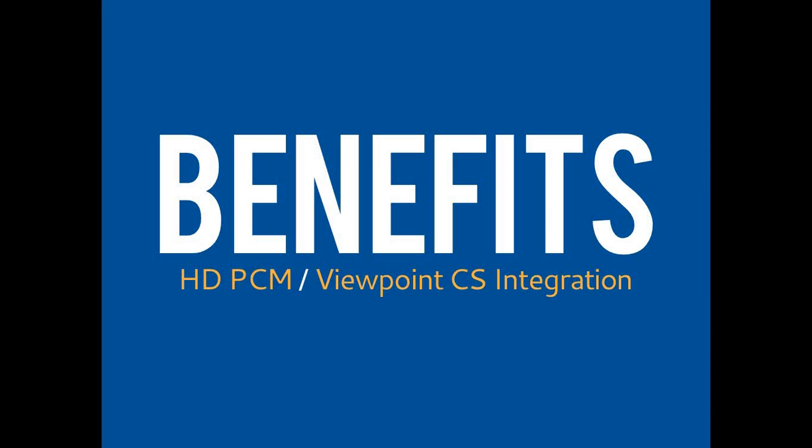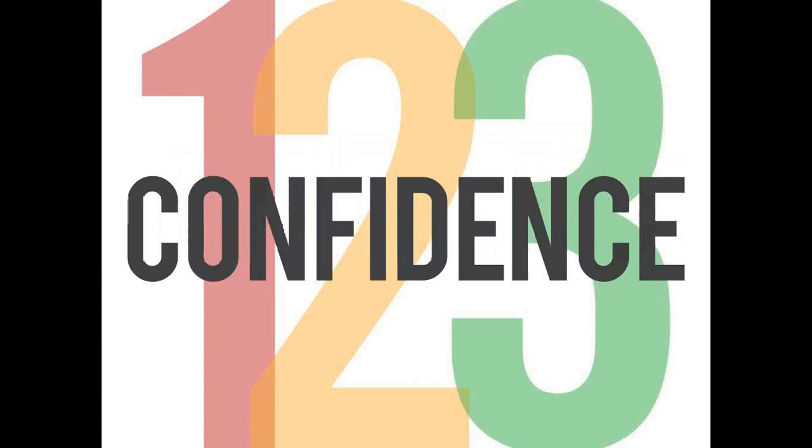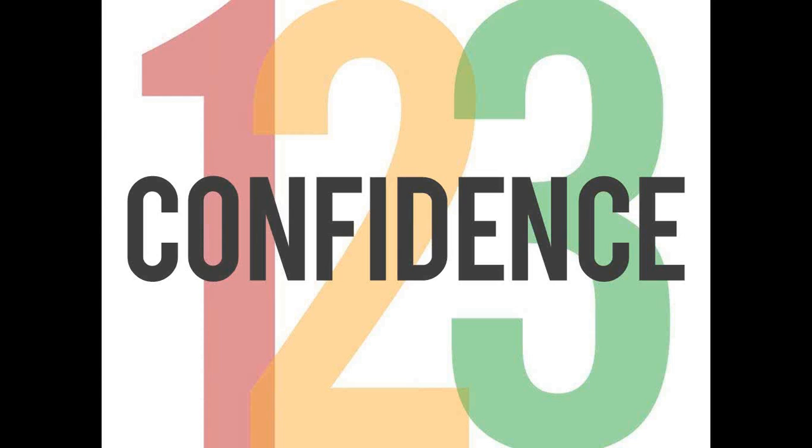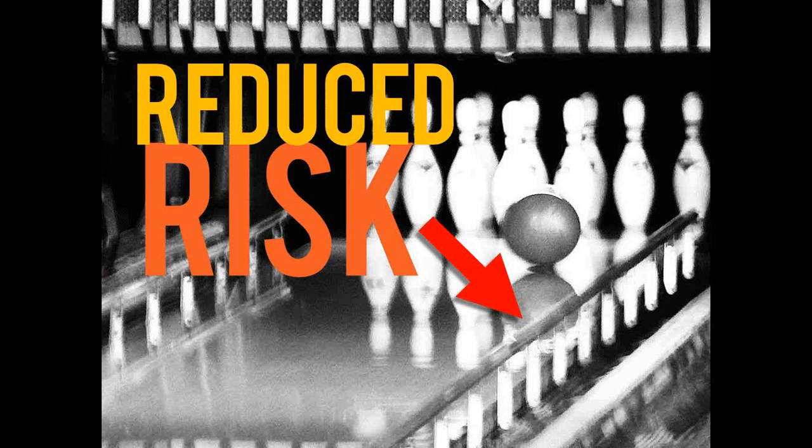The benefits of being able to do that are threefold. One, you gain confidence in the numbers, right? From an estimating standpoint, we have the detailed breakdowns. We're capturing our cost, our quantities, our man hours, the equipment hours, and accounting for our directs and indirects and profit. So you have that confidence from the estimator, all the way up to the owner of the company that this number is solid, and this is what we're going to go bid with and win that work.